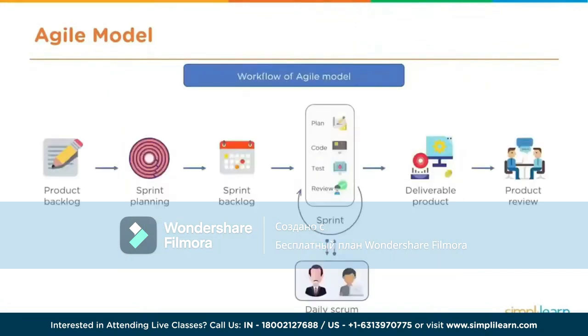What we have here is a breakdown of the ceremonies and the approach that you bring to Agile. So typically what will happen is that a product leader will build out a backlog of products, what we call a product backlog. And this will be a whole bunch of different features, and they may be small features or bug fixes, all the way up to large features that may span over multiple sprints. But when you go through the sprint planning, you want to break out the work that you're doing so the team has a mixture of small, medium, and large solutions that they can implement successfully into their sprint plan.